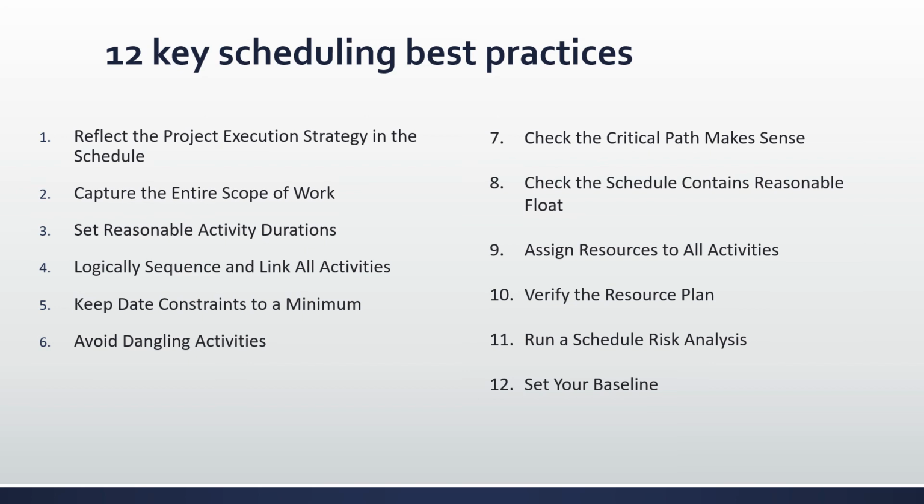This statistical model can determine the impacts of risk and uncertainty on confidence levels for meeting the project's completion date. A schedule risk analysis also helps you define the contingency or reserves of time needed for a certain level of confidence and to identify the focus of high priority risks. So be sure to include the results of your schedule risk analysis and mitigations when constructing an executable baseline.